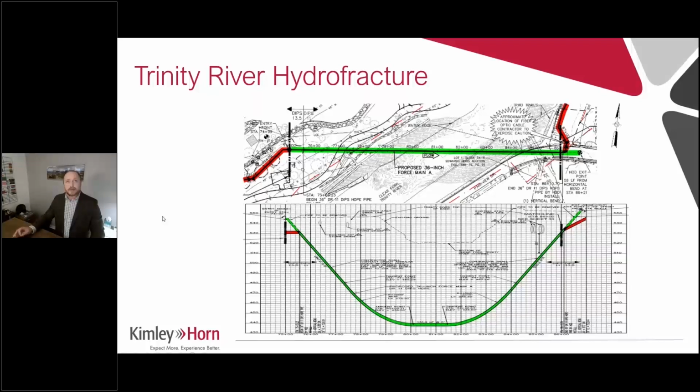Let me dial in on that a little bit. We had fairly high confidence in our geotechnical information, but this area to the right of the river specifically used to be an old landfill, so there's been a lot of weird stuff. As we were doing the pipe ramming to the north of here, we actually got some 1950s newspaper clippings from the Fort Worth Star-Telegram. So lots of interesting things coming out of the ground here, and of course our boring wasn't representative of exactly where that line went in.